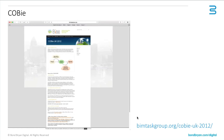There is more information on the government BIM task group website related to COBie, and there are also some very simple plain language questions there. COBie's primary aim is to deliver information at the end of a project for in-use preventative maintenance. So it's only focused on the preventative maintenance side — it has a very clear purpose.